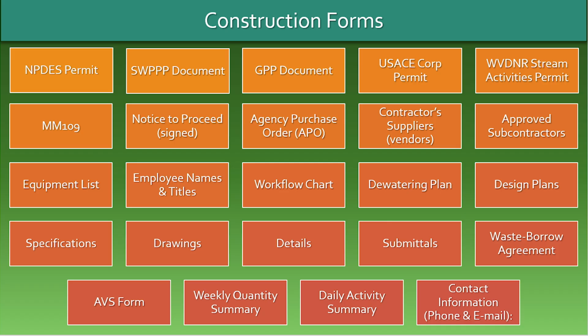Inspectors are required to keep one copy of every document provided to the contractor or from the contractor at the pre-construction conference on site. These documents will be used to answer questions or make necessary field adjustments as construction progresses. Documents may be in digital form, but must not rely on an internet connection to be viewable. Here are the most common forms you will need. Not all of them may be required.